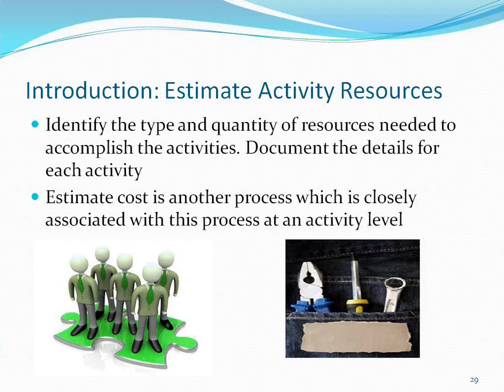For example, you have a bulldozer in your project. Then the activity of digging the ground will take less time. If you don't have equipment, you have to do it manually with a crowbar. Then the duration will be more. So what are the resources available with me?